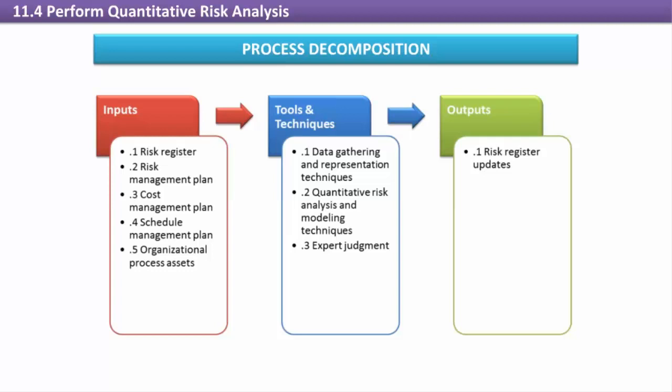Quantitative analysis results in updates to the risk register by expanding upon the risk data already collected. Data needed for quantitative analysis can come from historical information or commercial risk databases, but further interviews with risk professionals, subject matter experts, and the project team may be needed to gather estimates and likely risk scenarios if these weren't fully discussed during risk identification.